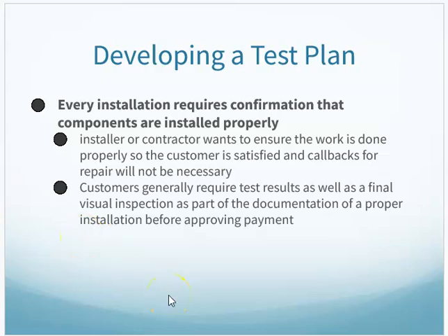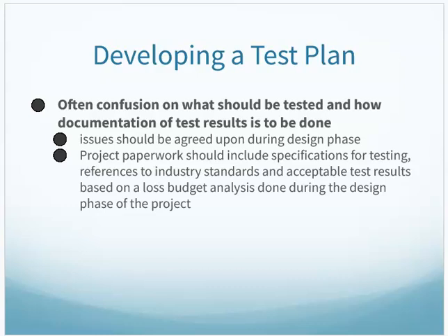After you're installing, or maybe even during your installing, what's your test plan? After install, after splicing, things need to be tested, and sometimes it needs to be tested there before you seal it up and put it in splice cases and that sort of stuff. Testing it while it's all out is easier to repair. It takes less time to repair. So sometimes you're actually doing this as you go.